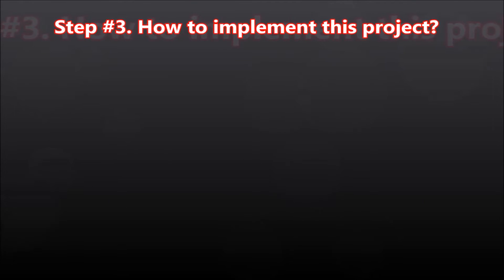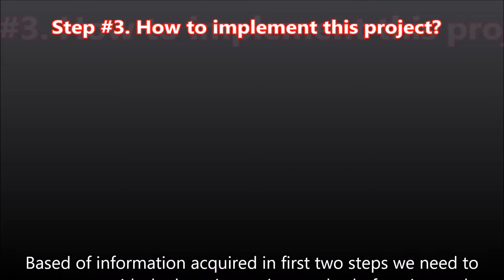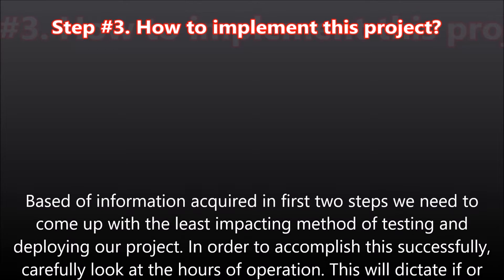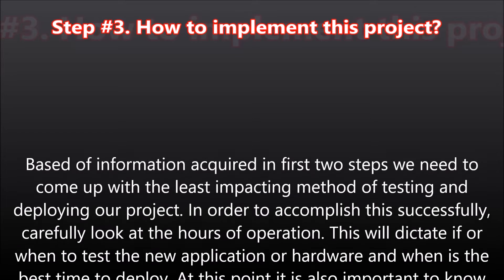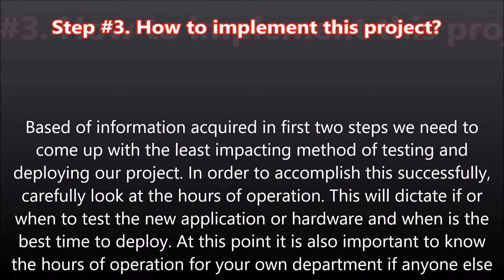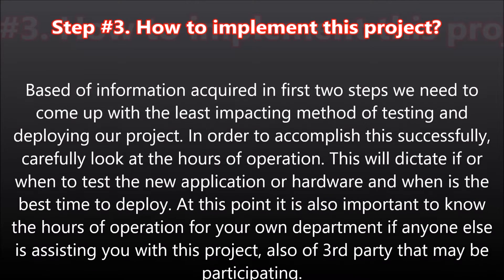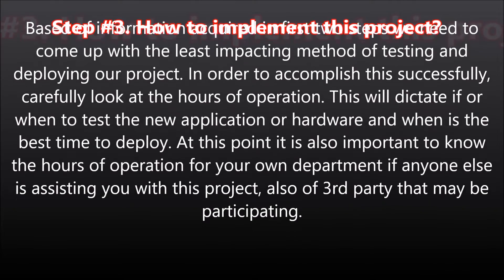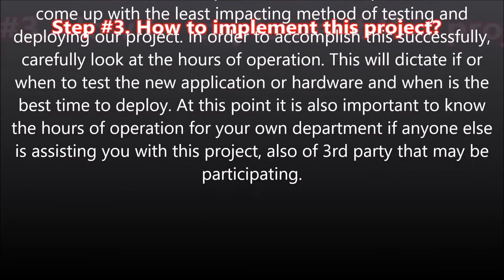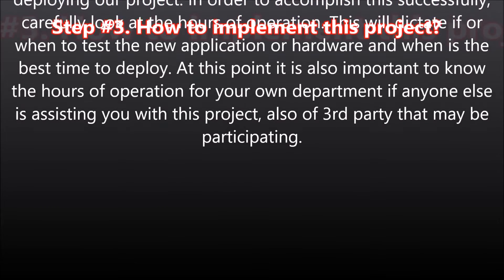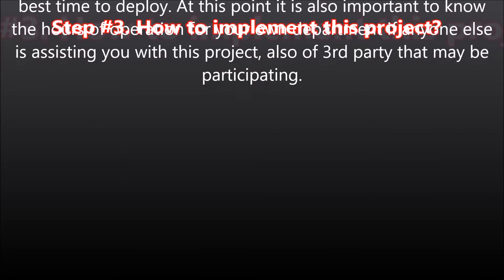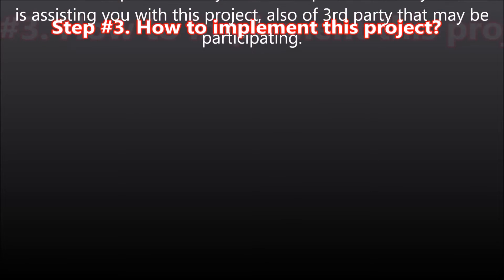Step number three: how to implement this project. Based on information acquired in the first two steps, we need to come up with the least impacting method of testing and deploying our project. Carefully look at the hours of operation — this will dictate if or when to test a new application or hardware, and when is the best time to deploy. It is also important to know the hours of operation for your own department if anyone else is assisting you, as well as any third parties that may be participating.